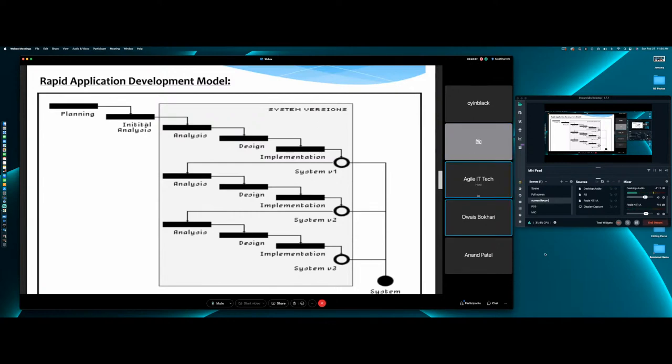Yes. All right. What do you want to assign to team 1? Design the engine and transmission. If they're just going to design, who's going to build? Who's going to implement? Who's going to test? Yeah, design, build, implement, test, and then deliver. Use the word develop. Develop, okay. We're going to handle the engine and transmission. Why are you giving engine and transmission to team 1? What is the logic behind that? Because they're directly related to each other. They actually integrate with each other.